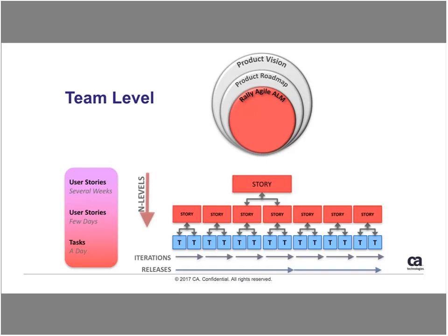You need to know the stable velocity of each development team, and this allows you to plan further out and then create your solid roadmaps that are visibly aligned to your strategies and vision of the business. So if I were doing this in person with you, I'd ask you these questions. So think about this. Are all of your development teams on the same cadence, the 2 to 4 week iterations? Some of the folks that I've worked with said now they're on 1 week or 3 weeks, or we mix it up and we change it. So in order to get to a stable, predictable state for those teams, you do need to be on the same cadence.